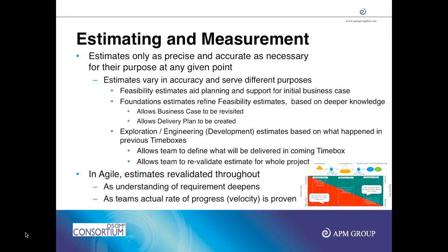People who have been using Agile may have some information. At the company I worked with, we had a 4 week time box, and we had some rate, like 30 story points per time box. So you have 30 story points per time box, and you have a total of 600 story points.